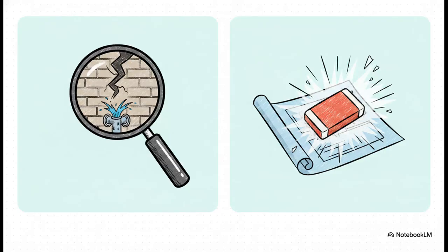It's also super important to distinguish between the two main types of internal budget killers. You've got unforeseen conditions and you've got late-stage design changes. Unforeseen conditions, like opening up a wall and finding a 100-year-old plumbing nightmare or a sudden economic shift, those are unpredictable. You mitigate those through really thorough initial assessments and flexible planning.